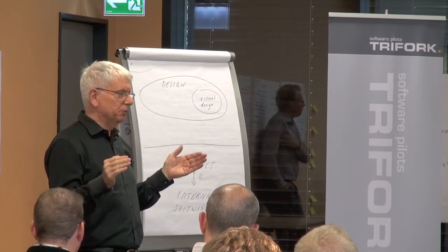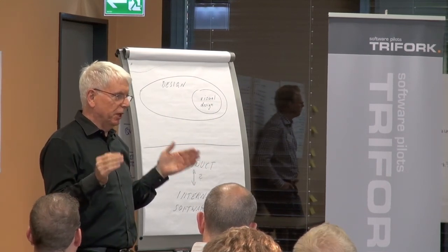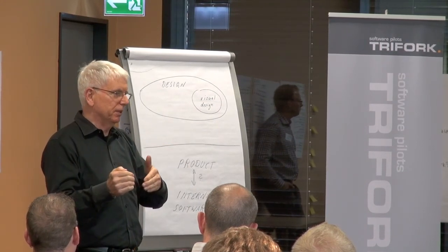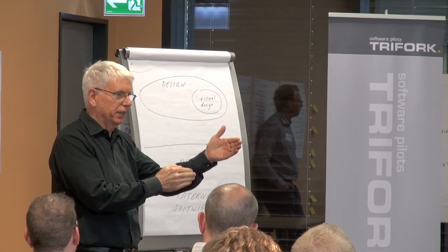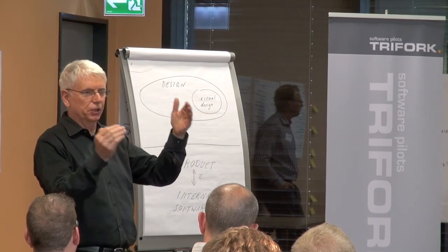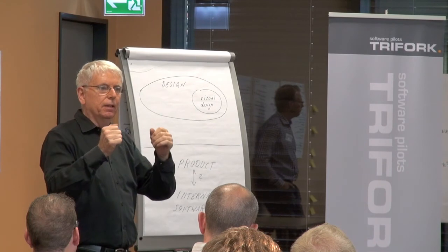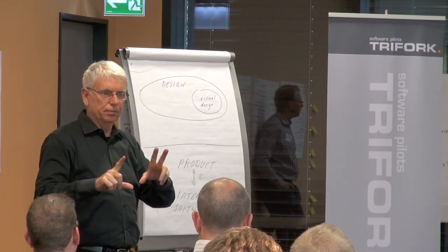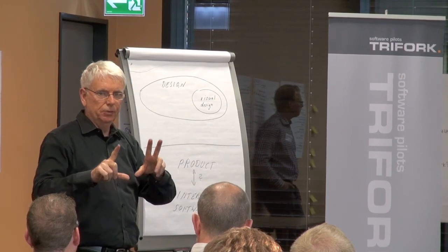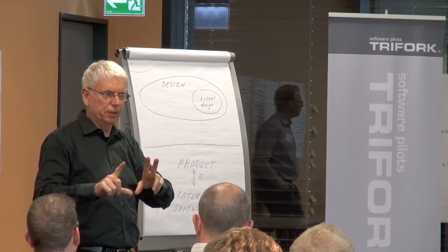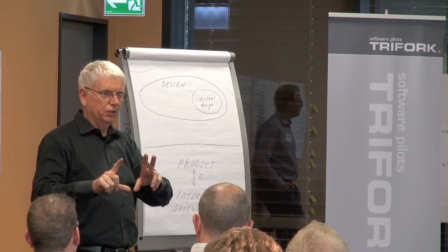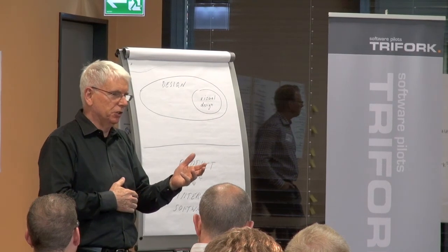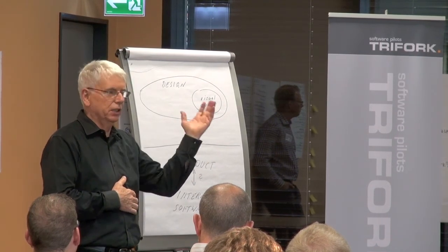Well, this is exactly what you want for a ready product backlog. The developer should be able to implement it without having to go find the product owner and answer a lot of questions. It should be really clear. The average length of a patent application is 5 pages. And that was the average length of PatientKeeper's specification. So in terms of the speed of development of specifications, it was an order of magnitude faster than any kind of waterfall thing.